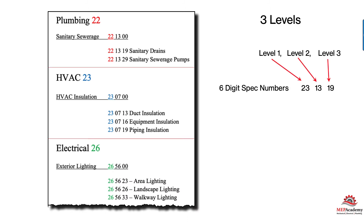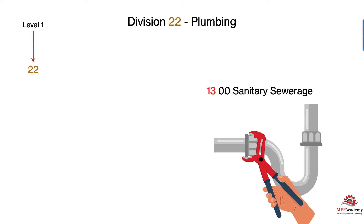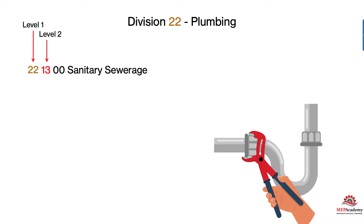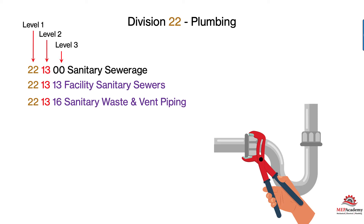The spec number is broken up into three levels of six digits — each level has two digits. We already learned the first set of digits is the Division. The second set defines a subcategory. So Division 22, which is Plumbing, is Level 1. The next level indicates, in this case, Sanitary Sewage. But we know there's more to Sanitary Sewage than just that, so that's where Level 3 comes in — the third set of numbers defines it further. In this case: Facility Sanitary Sewers, Sanitary Waste and Vent — they all fall under the main category of Sanitary Sewage.